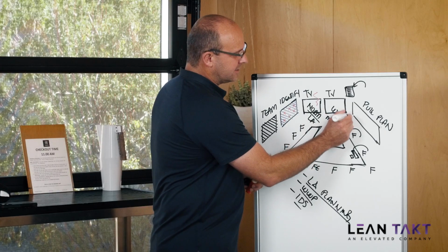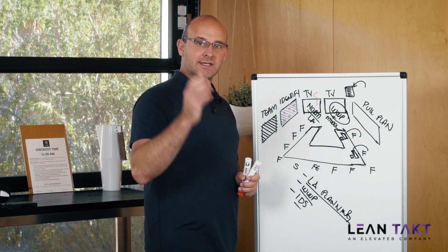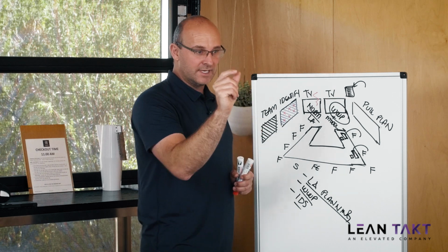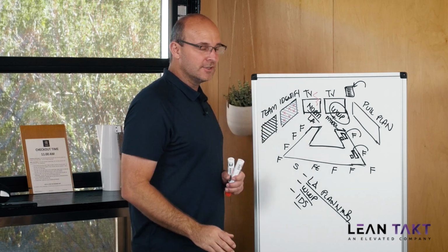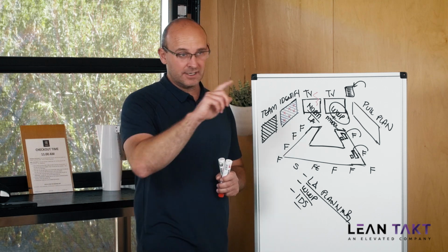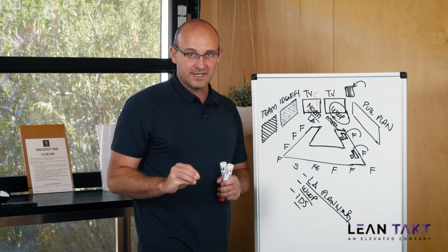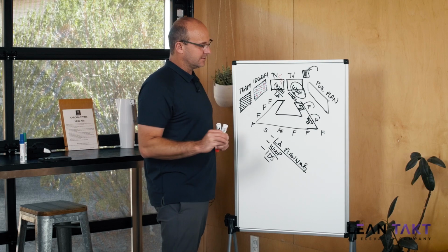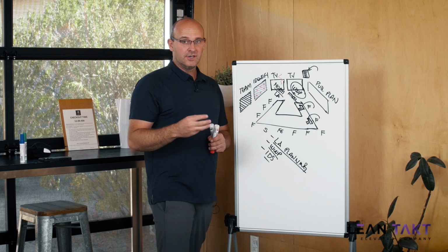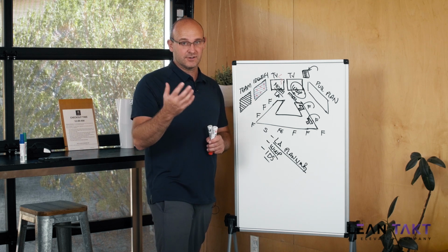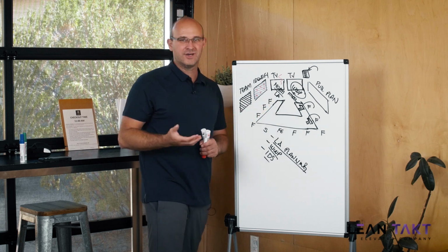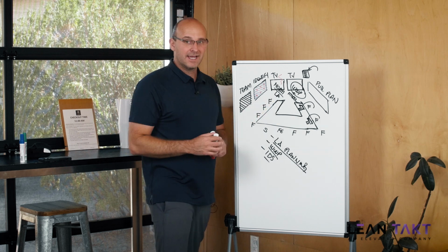Okay? So inside the weekly work plan, you automatically have all of it pulled down with the adjustments, and you show the handoffs. Because you're not creating it from whole cloth, and you're not wasting time in the meeting coordinating everything, because that's already done by using the takt production system, you can talk about handoffs, coordination, issues, what each trade partner needs from each other, right? Real how type questions, not when. We already know when. We already did the pull plan. Let's talk about the how type questions.